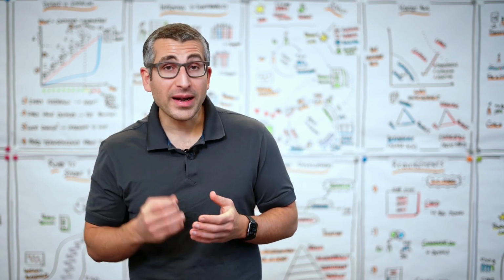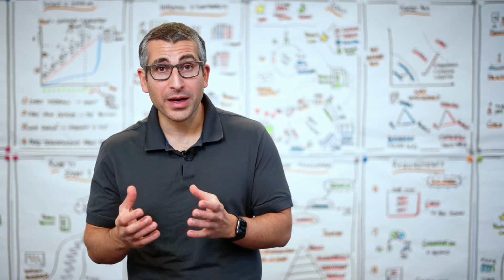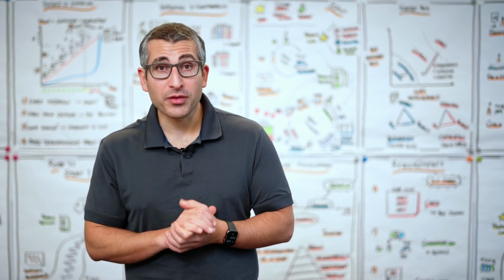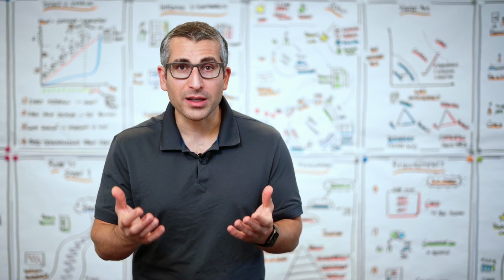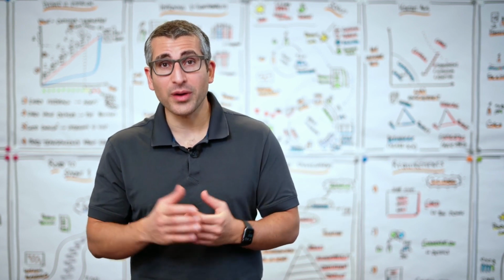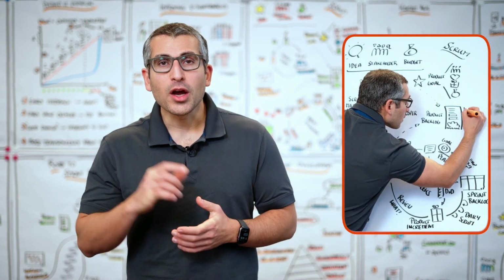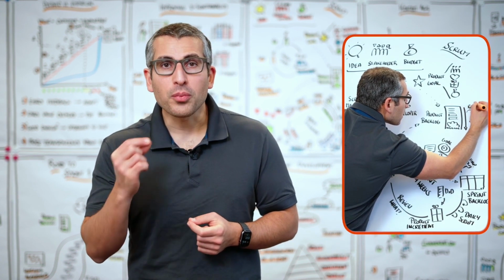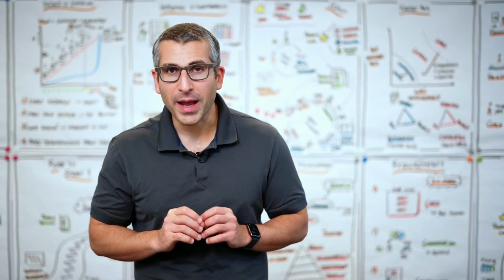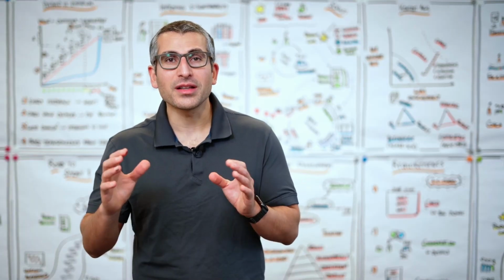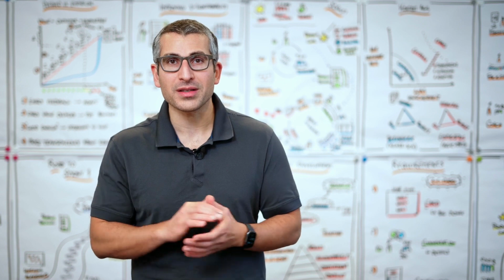Now, if we have already selected all well-prepared product backlog items in our previous sprint, we are left with a product backlog that is probably not ready for the next sprint planning. In order to avoid this dilemma, we do frequent and regular product backlog refinements, which means we try to create a product backlog that is ready for sprint planning while we're working on the current items in our sprint backlog. That product backlog refinement happens throughout the delivery phase of our current sprint.